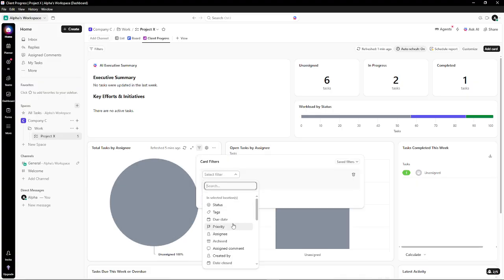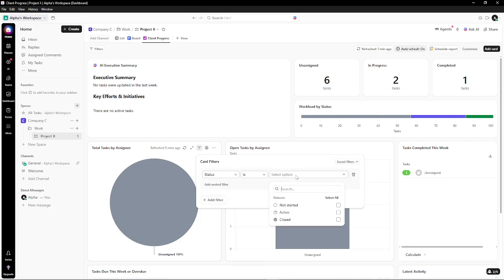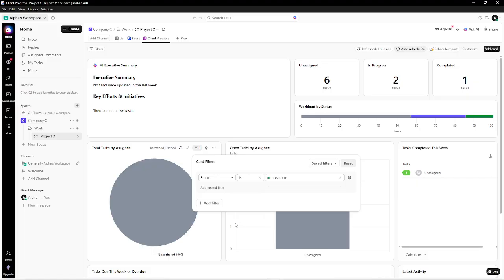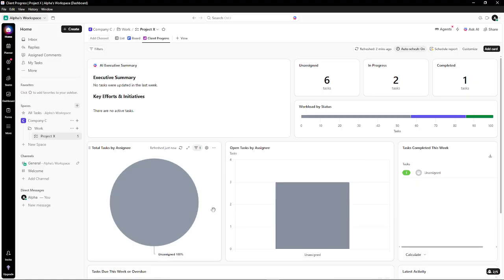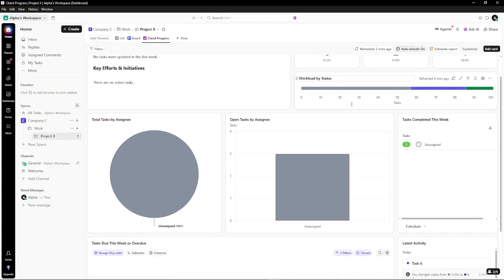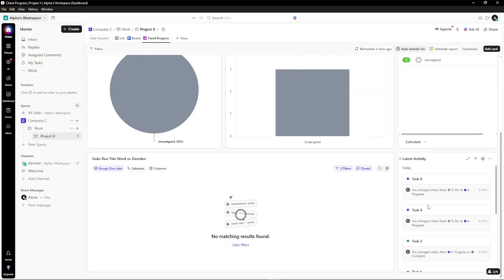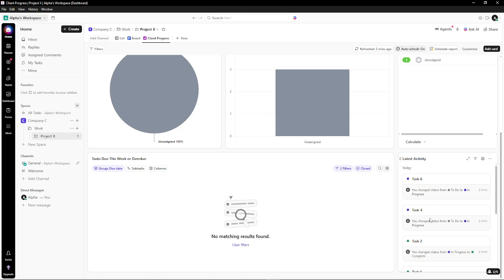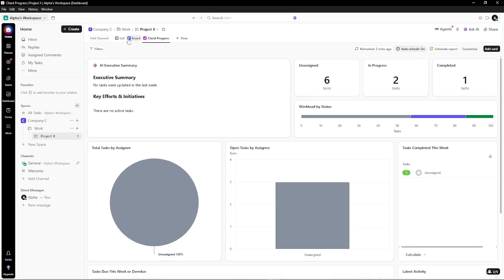When you're happy with the layout and data, share the dashboard with your team or clients. Set the appropriate access so stakeholders can view progress without changing your setup, and use sharing to keep everyone aligned without manual updates. Finally, monitor it regularly, daily for fast-moving projects, or weekly for steady-state work. Review trends, spot risks early, and refine filters or widgets as your reporting needs evolve.